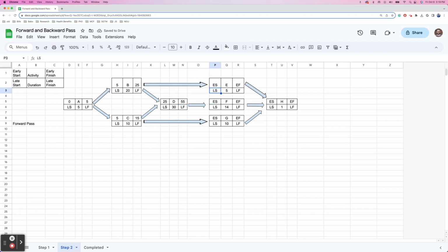Perfect. So now let's go back to here. ES is the EF of the previous task, right? And now let's add this up together.